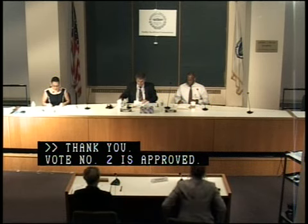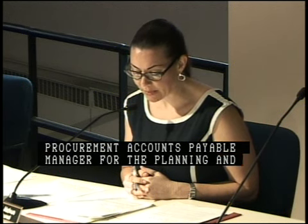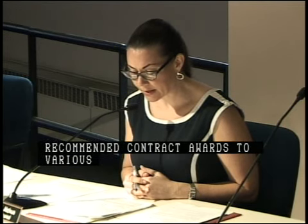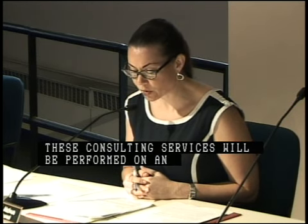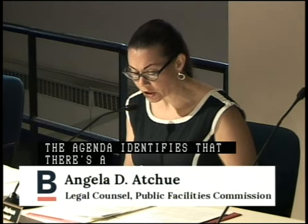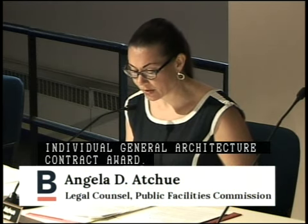Vote number three is being presented by Kelly Winston. She is the Procurement Accounts Payable Manager for the Planning and Management Division of the Public Facilities Department. This vote request concerns recommended contract awards to various designers and consultants to provide house doctor consulting services for city facilities, projects, and/or sites. These consulting services will be performed on an as-needed basis from July 1, 2018 through June 30, 2023. The contract awards are identified on the agenda and included in the supporting documents. The agenda identifies a recommended contract price of $3 million per each individual general architecture contract award. That's a maximum amount, or a not-to-exceed amount, for a 5-year period.